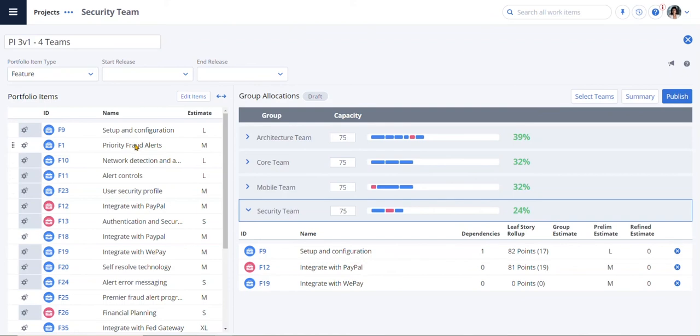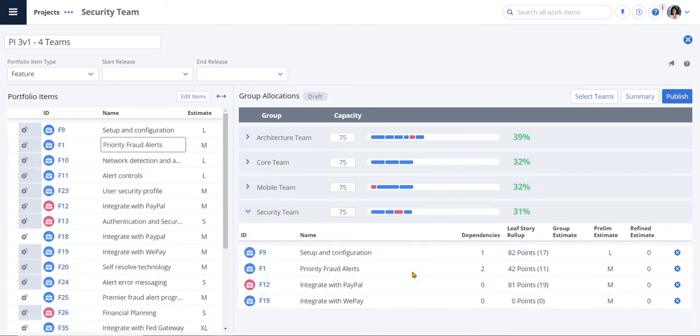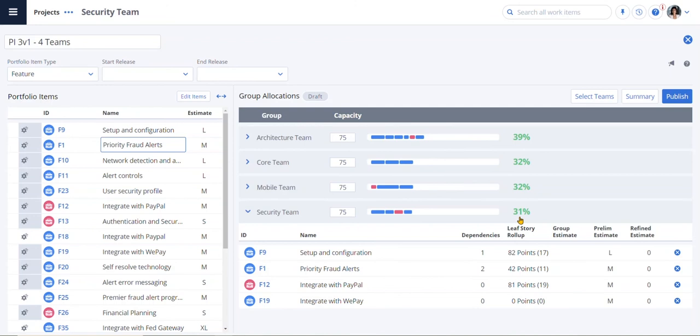I can easily drag and drop new features, such as a priority fraud alert, to see the impact and determine what the team can handle. By dragging on priority fraud alerts, I now see that the security team is at 31%. This gives everyone visibility into what we will be working on in the next PI or release, and we can have trade-off discussions that make sense.